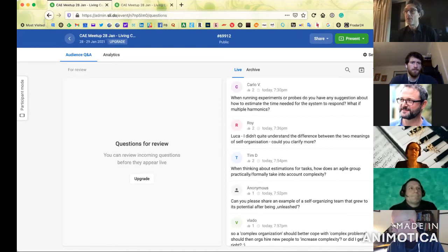Because of that, Joseph Perlin suggests changing one thing at a time and waiting enough time. So be slow, be patient, to give time for things to come out, become visible and stabilize. Basically, change one thing at a time and wait. And those are the two suggestions that I've heard so far.